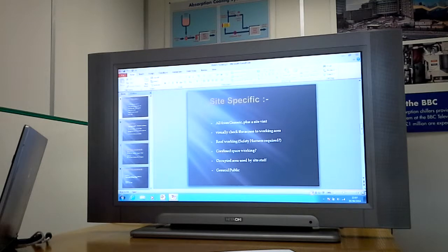If you are going to use subcontract labour, you need to itemise what they are going to do. They need to supply their own RAMS as well. Do you require site to do anything? All engineers' names, van regs, etc. Is it a site condition that two men are working at all times?